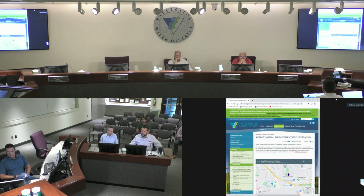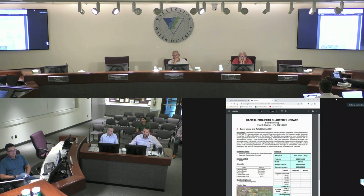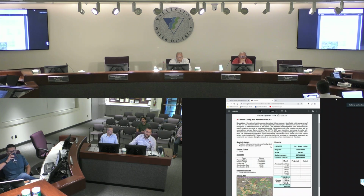2 projects I'm going to highlight today are, let's see, so if you come to the thumbnail and you select it, it gives you a brief introduction of the project, and if you click on this link down here, it takes you to the full update page. And this specific project, sewer lining and rehab 2021, is just now getting started in construction. We've gotten past traffic control, planning and permitting, and mobilization, and so the crews will actually be, starting this week, working out in the streets. So that's good news. This one is moving forward.